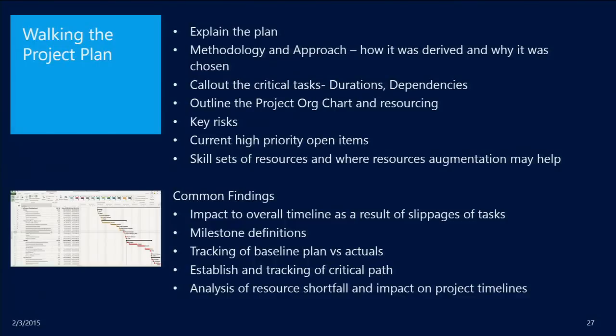Baseline versus actual tracking, very, very important in your project plan. I do oftentimes see that that's not there a lot. Also, establishing what is my critical path in the project plan. Very, very important. Surprisingly, how much it's not in project plans that I actually see. And also resource leveling and resource shortfall and the impact that's going to have on the project timelines.